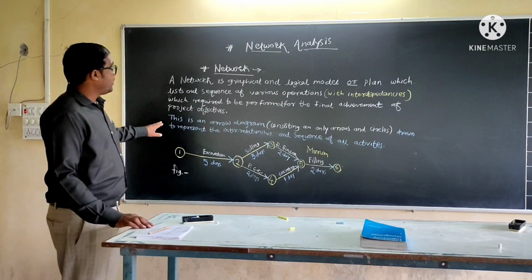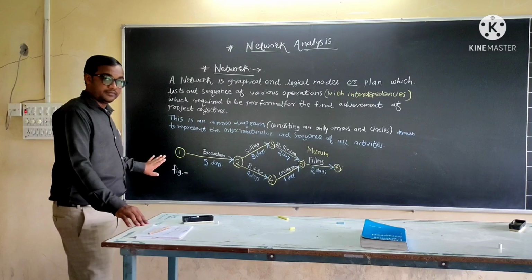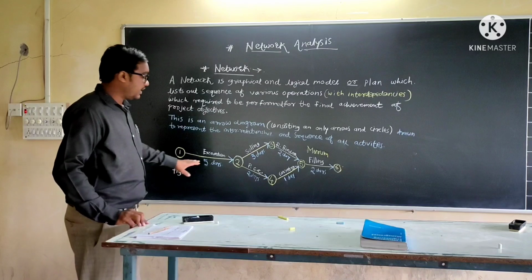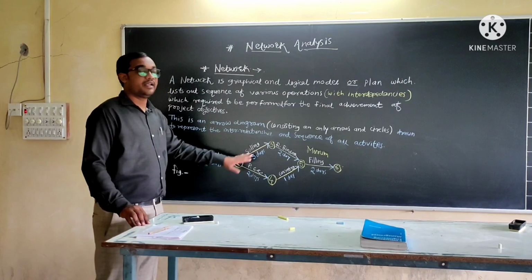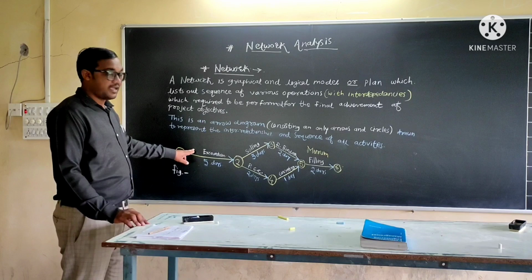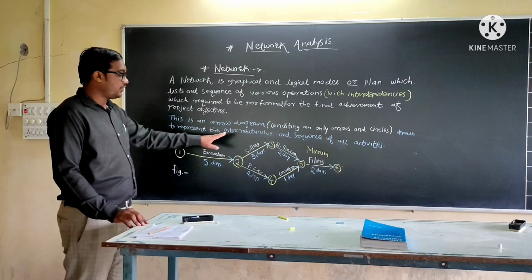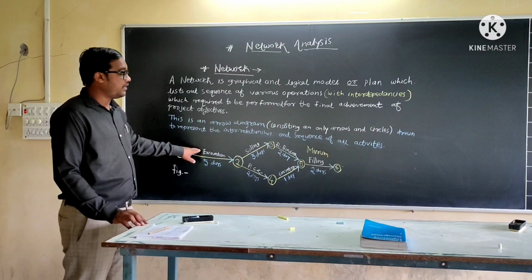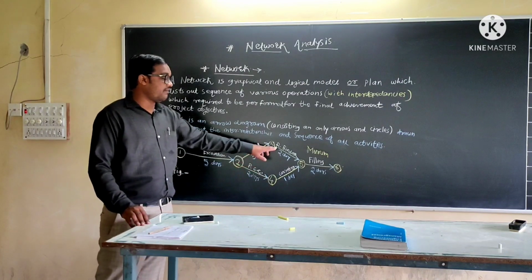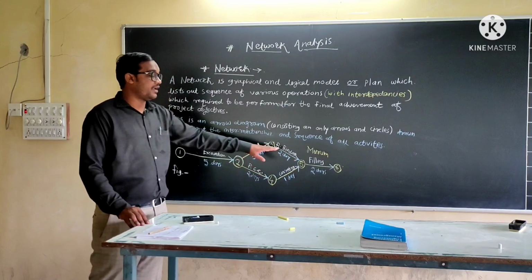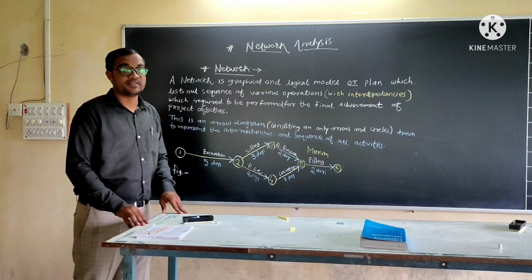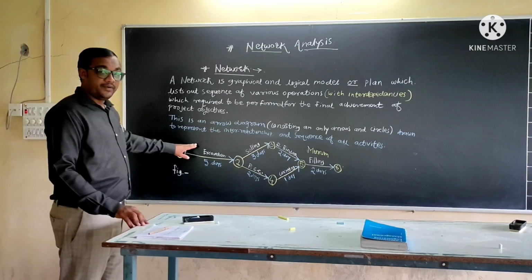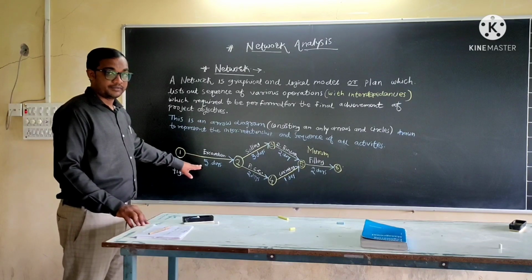The figure shows the network. In this figure, the interdependencies are shown: various activities and their interdependencies. Activities like excavation regarding building construction. I have drawn this network regarding the building construction. First, the activity excavation is completed, then soiling and PCC, then reinforcement binding and concreting, and after that, murum filling in the excavation trenches is completed. Every network shows the activities and their duration to complete.